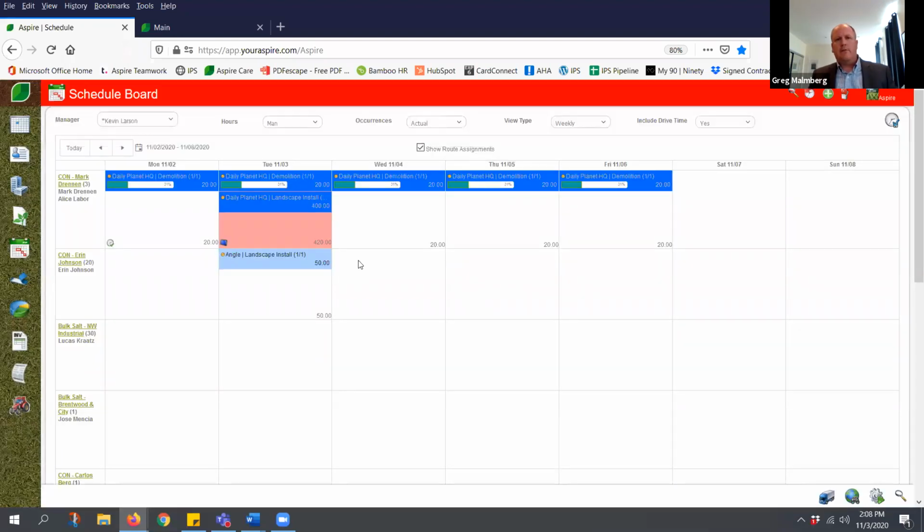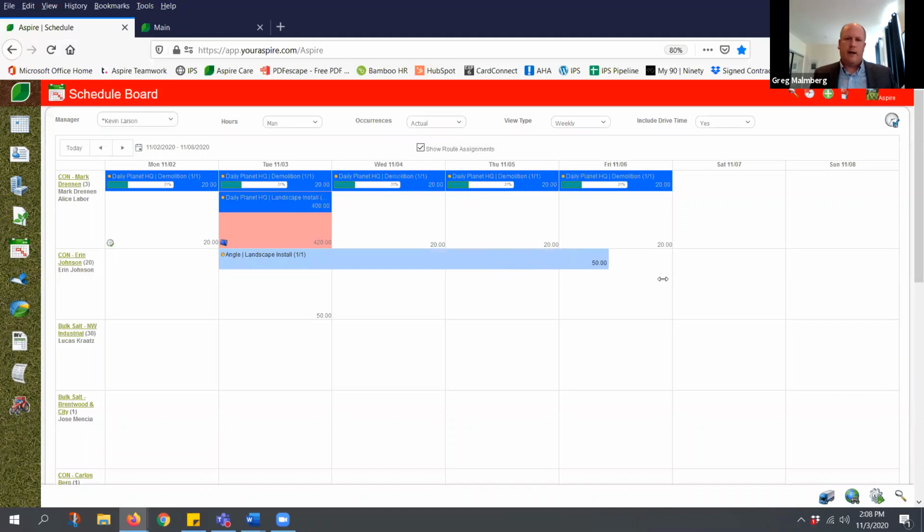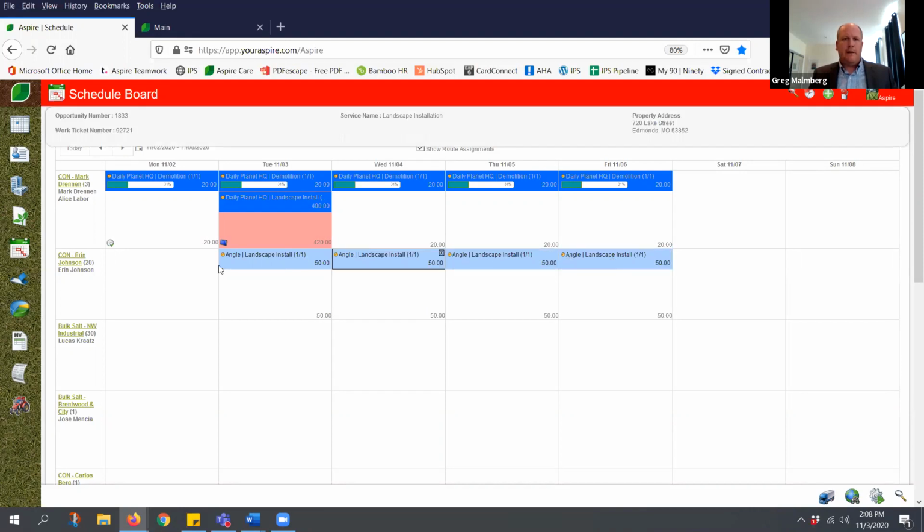One of the things we often see is when a ticket is scheduled, we schedule 242, we don't adjust the scheduled hours, and now I'm scheduling 1,000 hours for a job when the total job was really 250. So if I keep those visit hours in mind when I'm scheduling, the same schedule board rules apply. I can drag and drop. I can put these out on the board, right? 50 hours a day, that's fine. But I'm being realistic with what I schedule with the crews. This is what they see at mobile. This is their target. And this is what they shoot for.